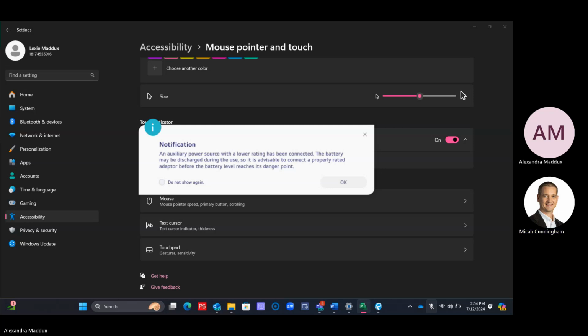If you had this also tied into a finish to start with core slab, and you linked those together, it's not pushing out the date of core slab because it's still 7/12, not after 7/11. But now if this took 10 days, it's going to push out the core slab. Does that make sense?